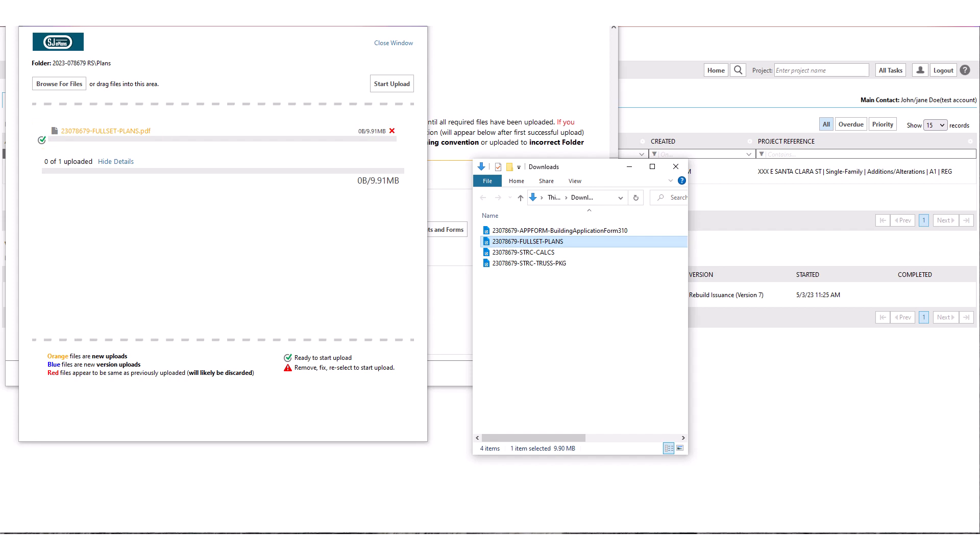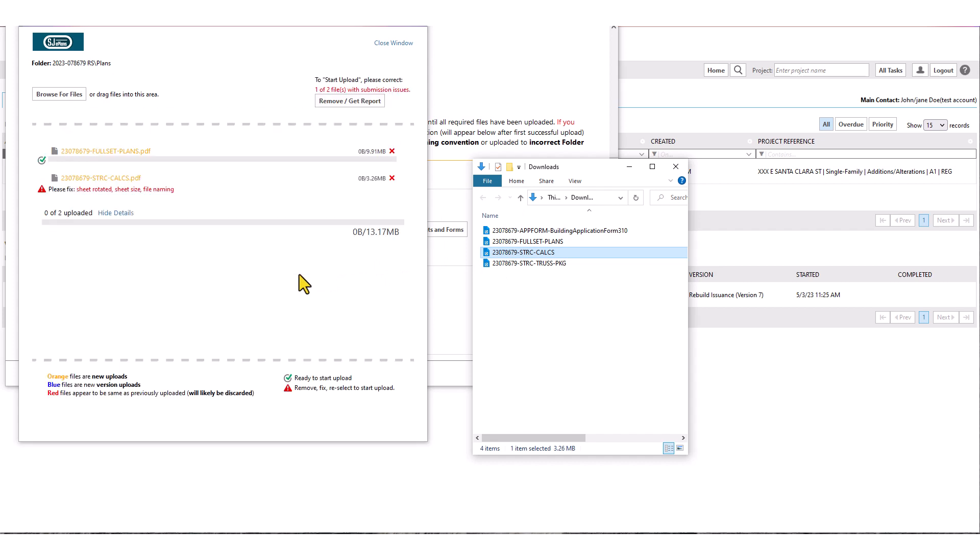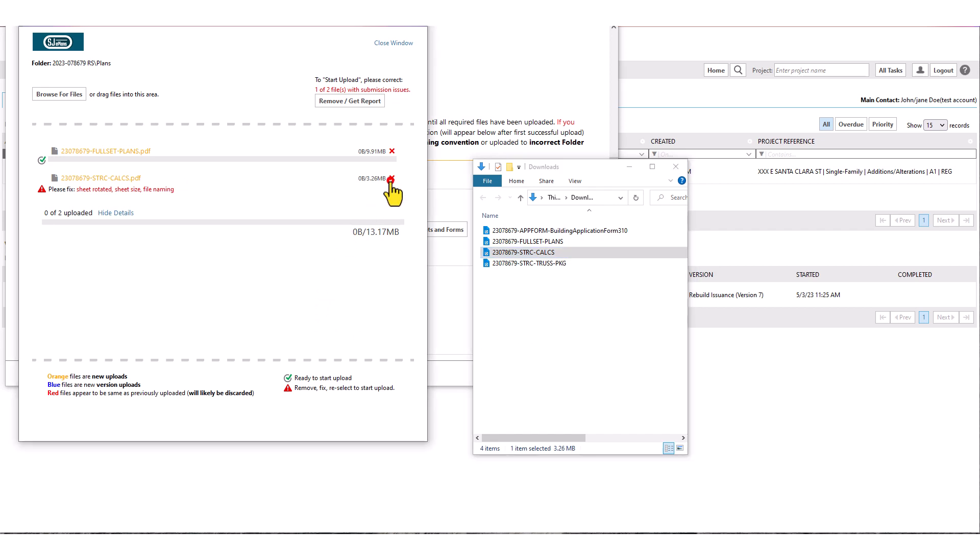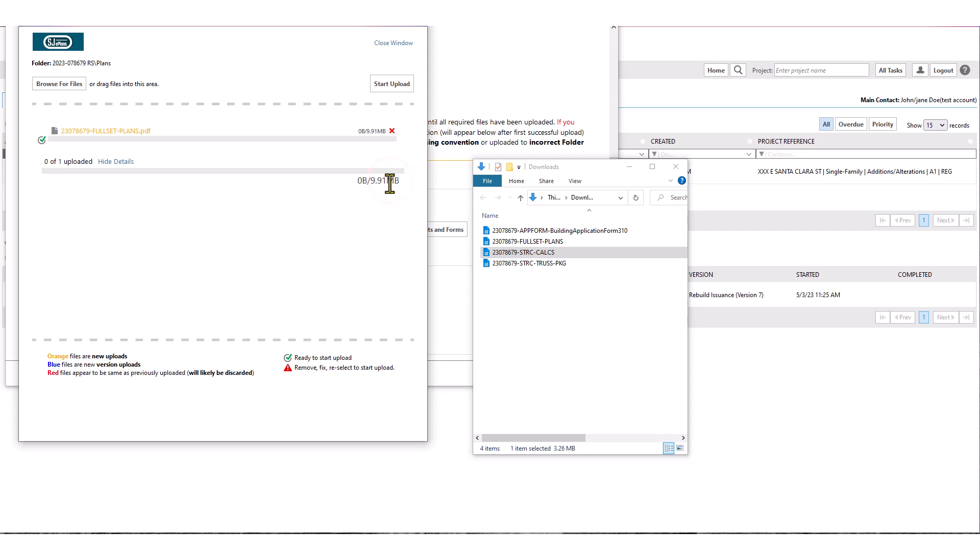In case an incorrect or non-conforming file is detected by the system, you will see the red message along with some hints as to the issues detected. For example if you tried to upload the file for structural calculations into the plans folder, error will be raised. In this example it indicates that sheet orientation, sheet size and file name do not conform to the requirement for upload to the plans folder. For as long as any file in the upload window contains an error, no files can be uploaded. You must click on the red X next to the file with error to remove it from upload page. Then click on start upload button to upload the remaining correct files.